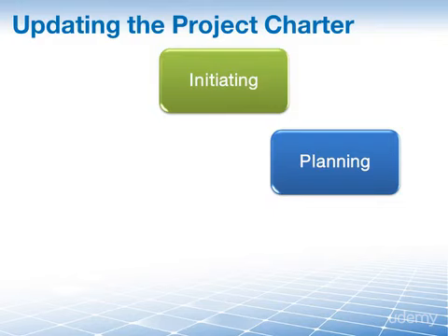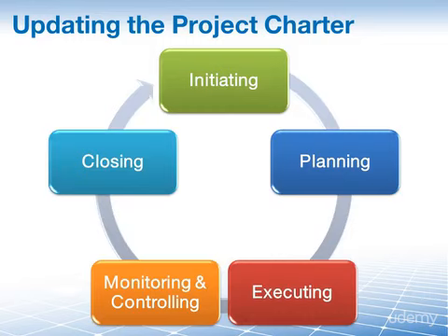Once the project charter is signed at that planning stage, it typically remains fairly static. There are other project documents, such as the project management plan and its subsidiary documents, which will undergo much more progressive elaboration throughout the project. So when you are executing, monitoring and controlling or closing the project, it would be under unusual circumstances that the project charter would need to be changed. For example, a major change in the project, like a change in the overall direction or change in the project sponsor, might cause the project charter to be updated in these executing, monitoring and controlling or closing process group areas.